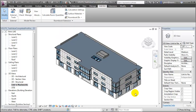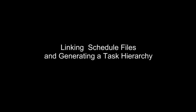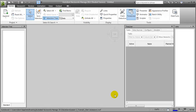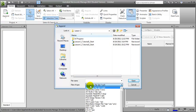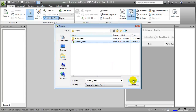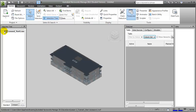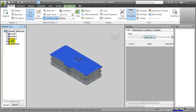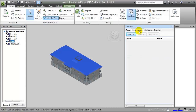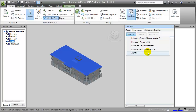Having exported the elements of the building model, we're now ready to bring the model and the task timeline together in Navisworks. Let's start with a new Navisworks model. The first step is to import our model of the building elements by appending it to this Navisworks file — we'll choose Append, choose the NWC file format, and find the building model we've just exported from Revit. Say OK, and you'll see it appears within the model area and we can select the elements. The next step is to import our task timeline. We'll switch over to the Timeliner pane. To import the timeline we've already created, I'll switch to Data Sources, then click Add to bring in the CSV file. You'll see that many other project scheduling formats are also available, but we'll choose the CSV.